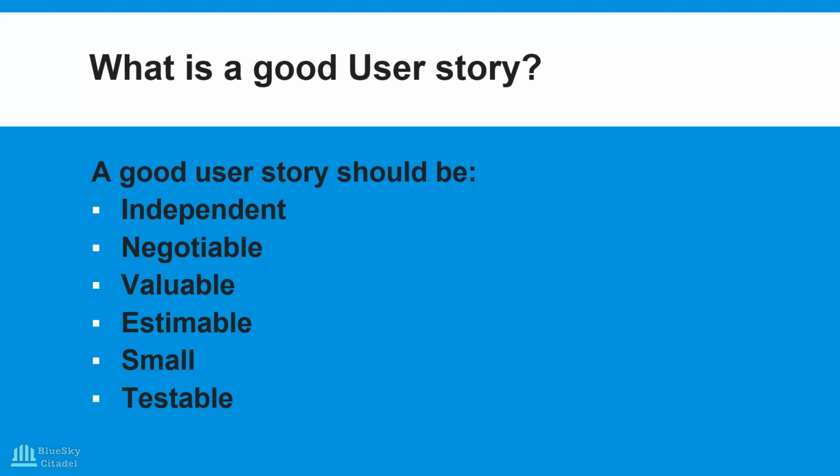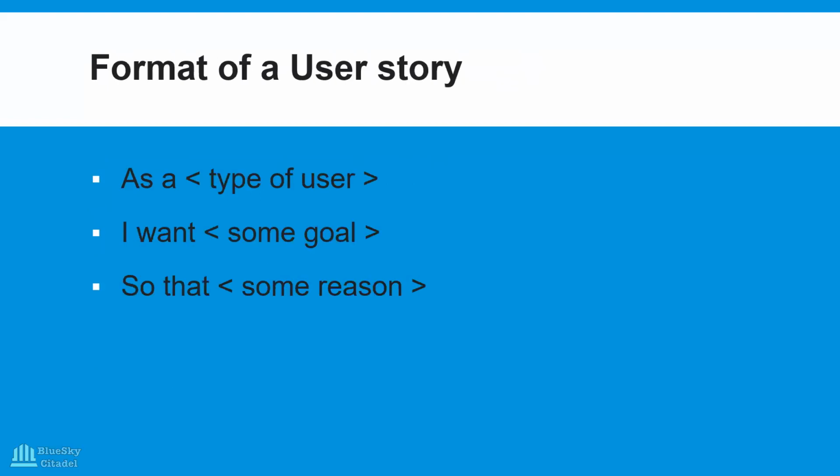If you want to think about it in another way, remember that you are, as a business analyst, trying to deliver value to the organization you're working for, right? So how do we know that you finished what we agreed that you are going to do? You can justify it when you have a tick list that you're working your way through. So a good user story should be independent, negotiable, valuable, estimable, small, and testable, right? So we're going further into the final details of a user story.